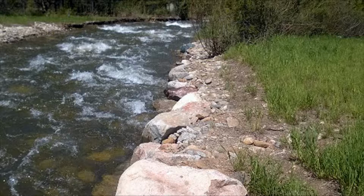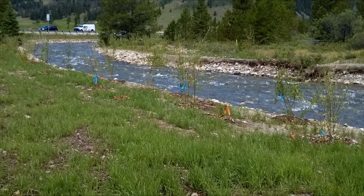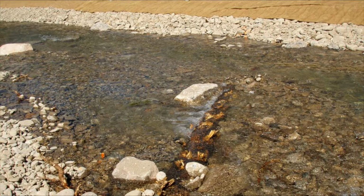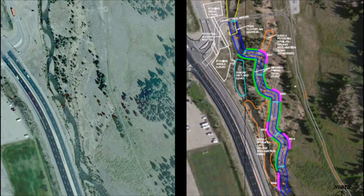Evaluation of Phase 1 showed that some design modifications were needed for Phase 2. More extensive modeling determined that sequences of riffles and pools like those planned for Phase 1 would not be maintained over the long run. High water flows would wash out the pools, destroying the fish habitat. It was determined that more localized, micro-habitat pools, created by large boulders and wood logs, would be more self-sustaining. Due to fundraising issues, construction was scheduled for 2015.